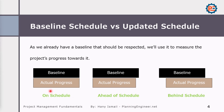Simply, the baseline can be represented with a bar chart and some data in our schedule, and the actual progress will be represented by another bar chart and another data. If the actual progress starts exactly as the baseline and forecasts to finish exactly where the baseline ends, it means we are on schedule — nothing is wrong. If we are forecasting to finish before the baseline, we are ahead of schedule. But if we are forecasting to finish after the baseline, then we are behind schedule.